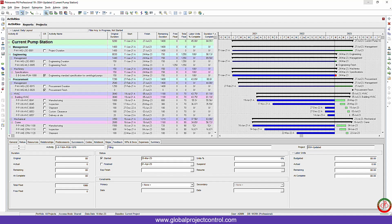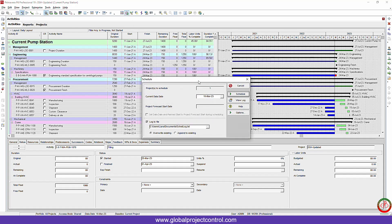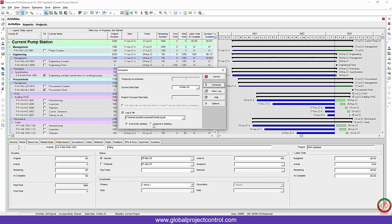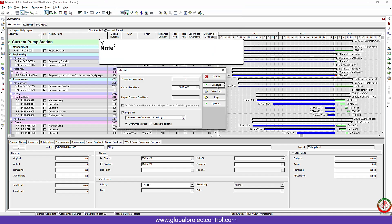What is the main item on the schedule log? As you see, I have the updated schedule over here. When you press the schedule button, if you can find the colorful view log here, it means that you checked this selection box for log to file. If it is grayed out, you need to check this one. You have two options: override and append to existing. Both of them are applicable, but you should at least one time schedule your project.